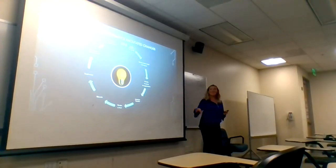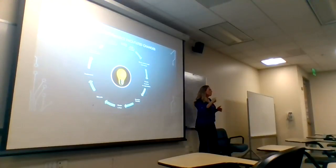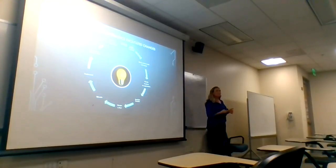And then design and test. That usually is the bulk of getting it done: design, test, and educate. That takes up so much time just to get it done right, and test against all the possible variables. Then implement, and then monitor for improvement. We always like to go back and make sure, hey, is this really working? Is this meeting the need of the person who is asking for it? Or did it create an unexpected downstream impact? I've done that many times, no matter how many questions I ask.